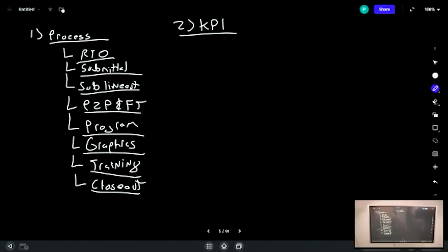Re-estimates should not be made because your team cannot execute. They should be made because scope was missed or a timeline got compressed or something like that. And also, if the timeline gets compressed or an addendum comes out and you have to add scope, you should be doing a change order if appropriate.